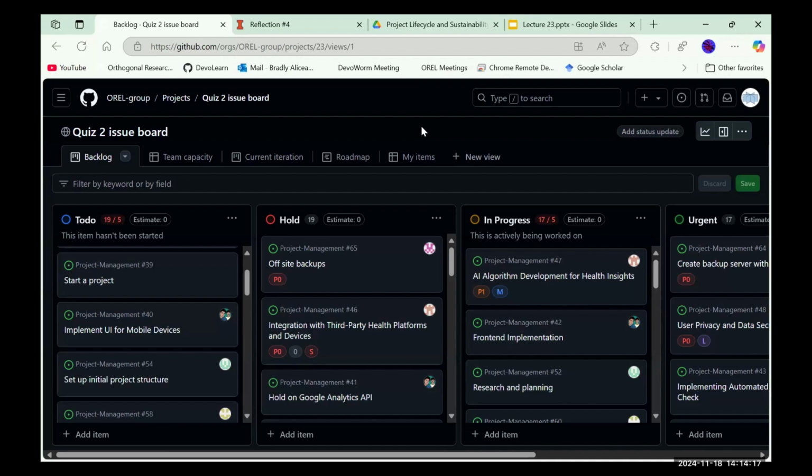Here's what's in progress, so kudos to people who are getting things going. Here are things on hold, so why are they on hold? Can we comment, can we clarify, maybe we can get them back on track? And then the things that are to do, which are the least important, because those are all things that maybe need to be done later. And people will just be moving things from that. And so that's how you would do that in maybe a stand-up meeting, some sort of sprint, or whatever kind of agile-like thing you decide to use, as a way to do your project board reviews.